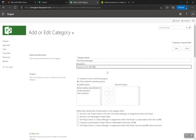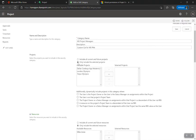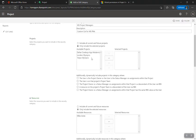In the category settings for project managers: do you want them to see all current and future projects, or only selected projects? I'll choose only selected, but rather than manually picking projects, I'll use the dynamic options below. The dynamic setting says 'additionally, dynamically include projects in this category where' — I never use the top static section; I always use the dynamic bottom section.